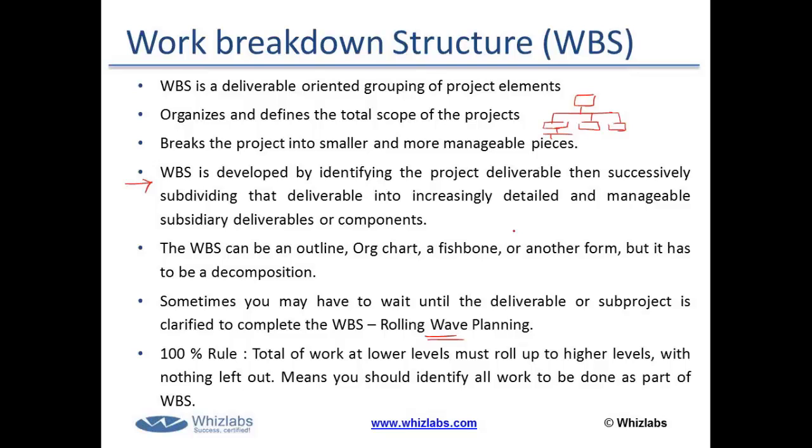For example, let's say your project is about connecting two buildings through the networking process. Now, you create the entire plan for this connection purpose, and once your plan is ready and you're entering into the execution phase, then you take up a decision whether to go for a wired solution or a wireless solution. That's an example of progressive elaboration.